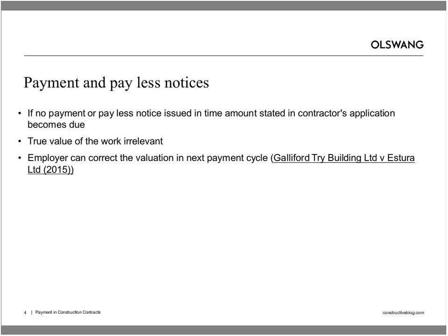I think that shows just how important it is for the contractor to make sure that it issues its payment application strictly in accordance with the terms of the building contract, because if it doesn't do so, then it may end up in a position where there's effectively no effective payment notice in place.